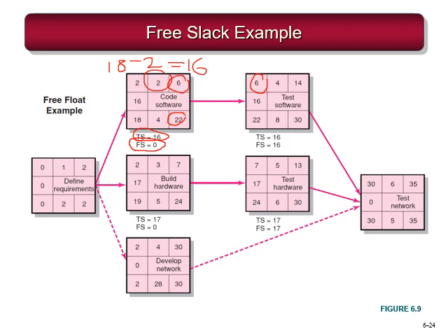But if I take the example of activity 4 here, it has got a total slack of 16. That's fine, that's same as the previous one. But it has got also a free slack of 16. What is it? It ends on the 14th day, that is the early finish, but the early start is on the 30th.